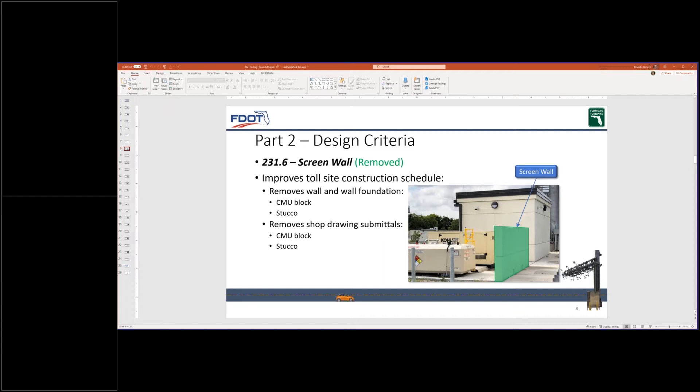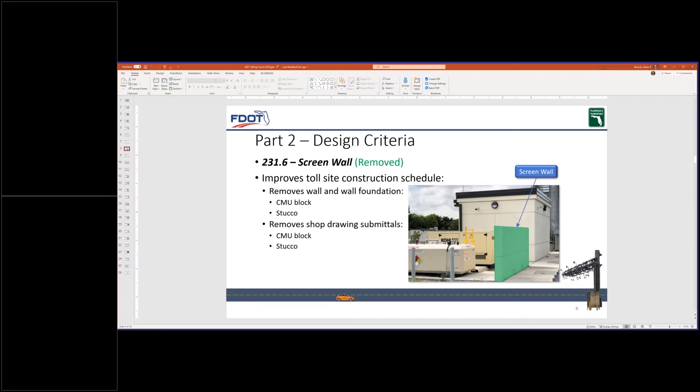Through coordination with construction, CEI and contractors, we have removed the screen wall from all toll sites. This infrastructure removal reduces construction time, removes below ground coordination between the screen wall foundation and conduits, and removes two technical special revision sections that are associated with those shop runs. The highlighted screen wall shown in the photo will no longer be required for future toll sites using the 2021 GTR.